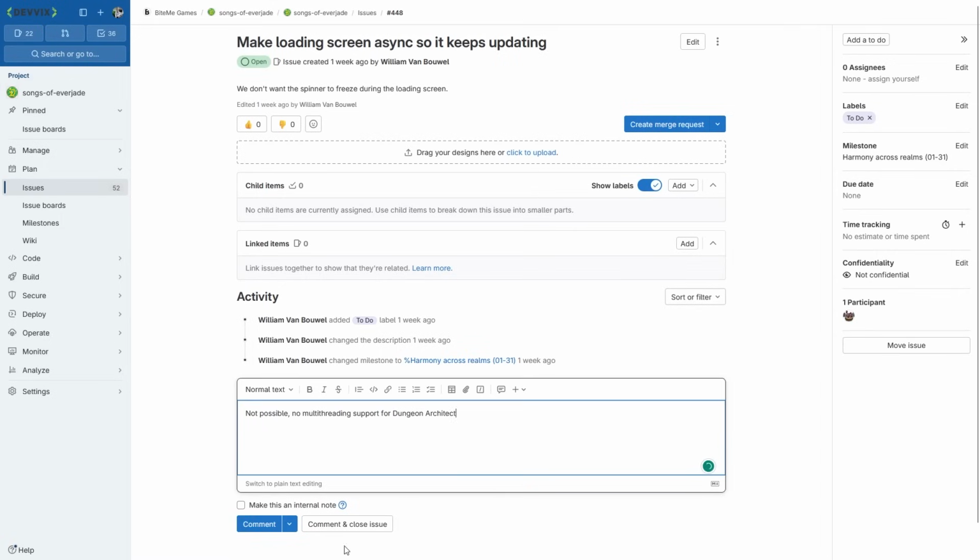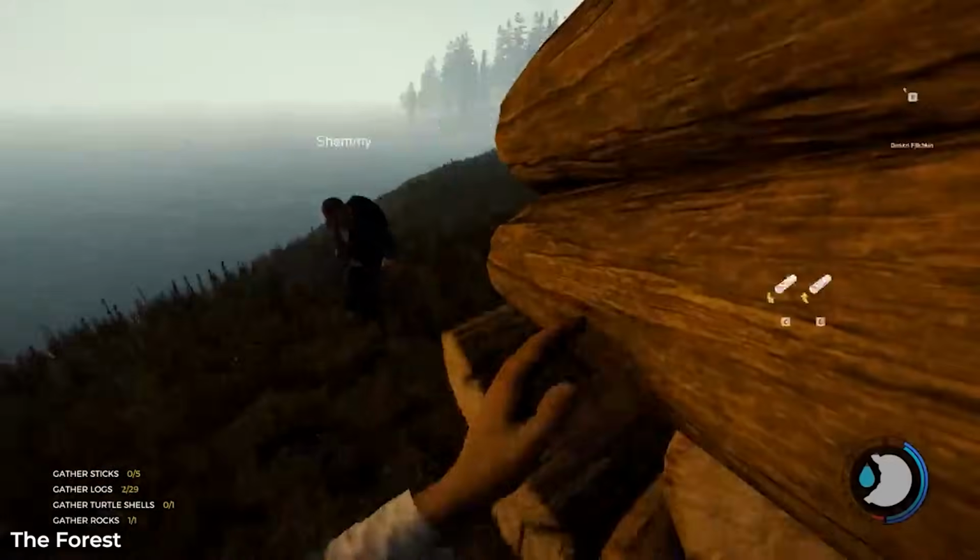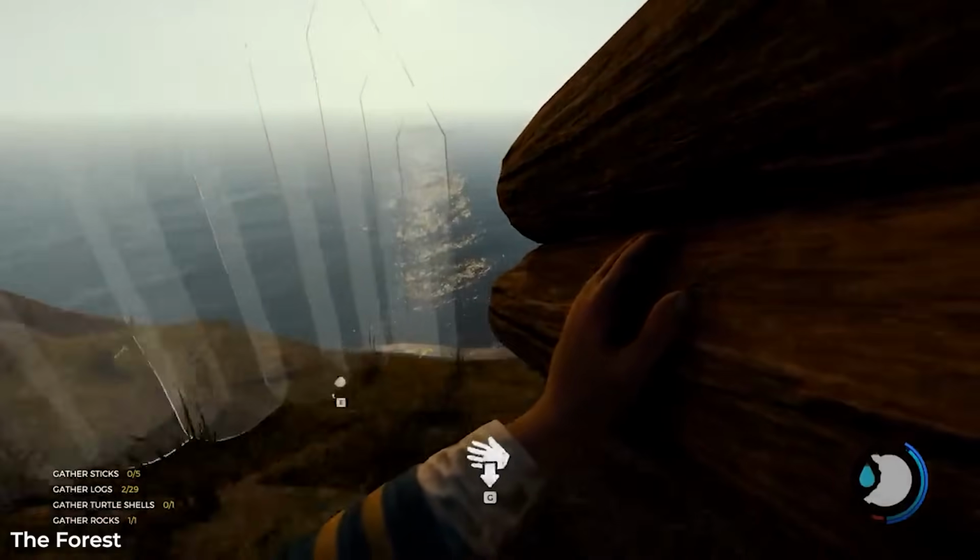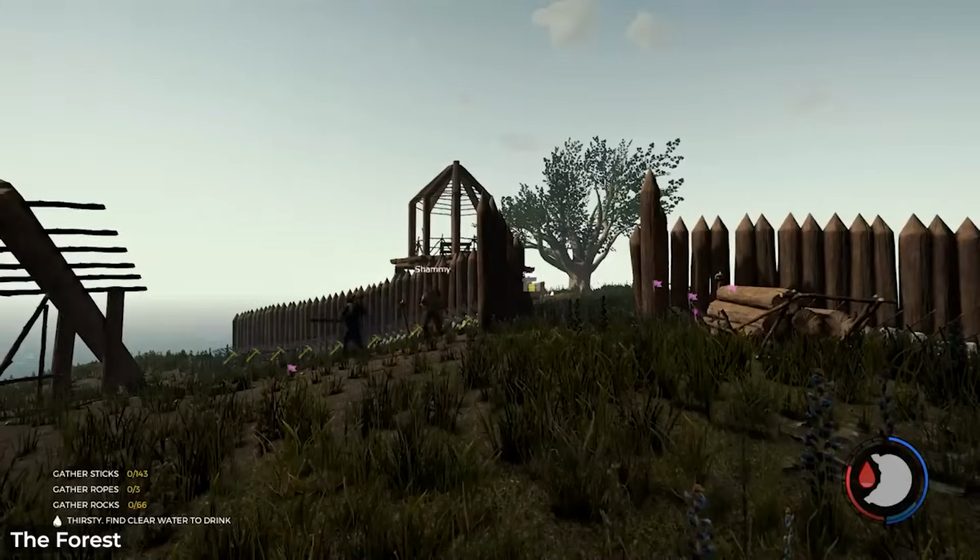But in reality, you don't. You would like to have everything there, but there's a very big difference between liking to have certain features and being able to actually release your game. So this is where you're going to go through your backlog, go through everything that you've written down of, oh, these are the features we still need to add. Maybe it's like, I need these specific extra characters, or I need this many items. And look at it objectively and be like, hey, look, do I actually need this for my game to be fun?